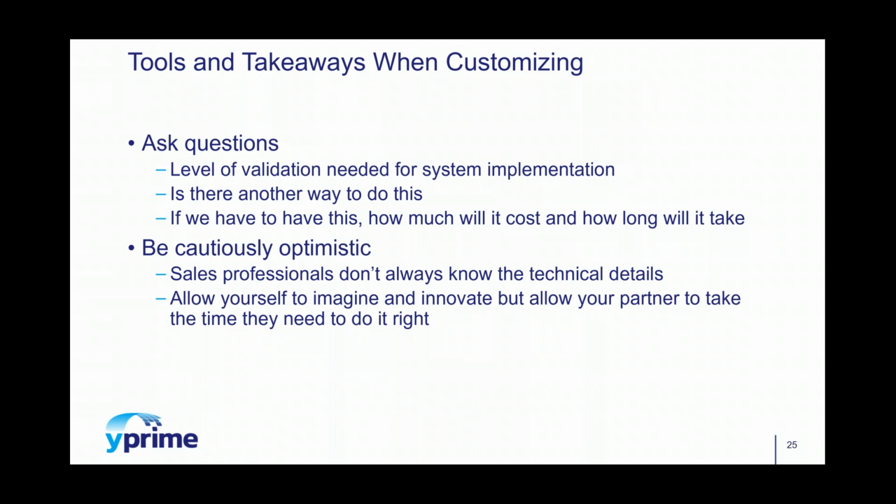A developer writes custom code that then needs to be tested by a validation engineer. If it's configurable, challenge your folks even further. Say, are you able to show me that configuration right now in front of us, or is it something that you would have to have someone do on the back end of the system? Again, all of the answers to these questions aren't right or wrong, but it's important that you educate yourself and understand that sometimes when we say something is configurable, not everyone understands the same technical details, and it actually may take more effort than we think.